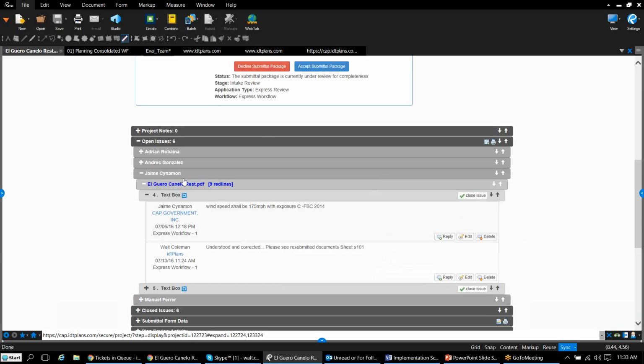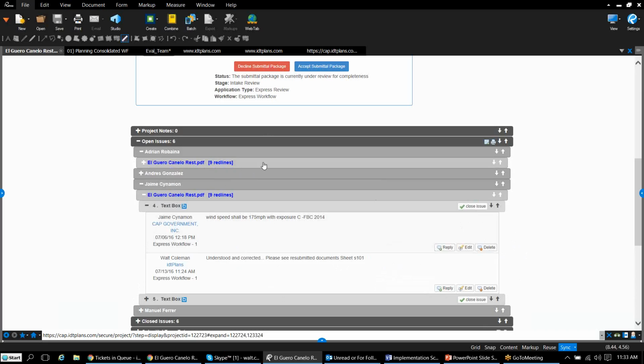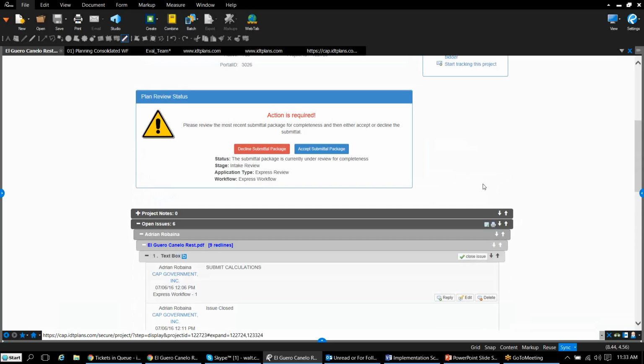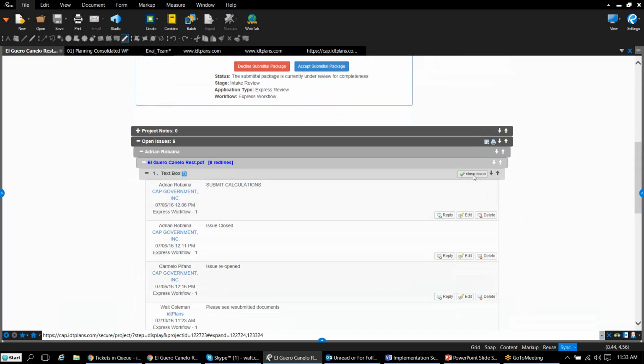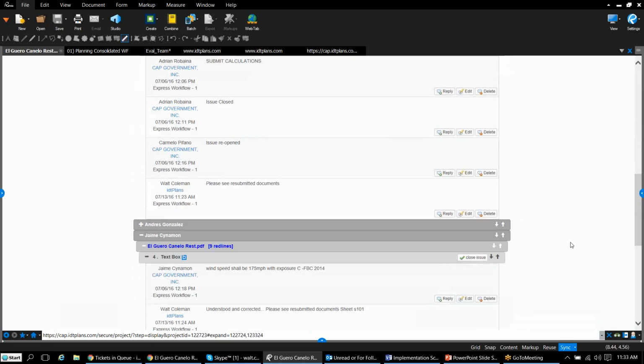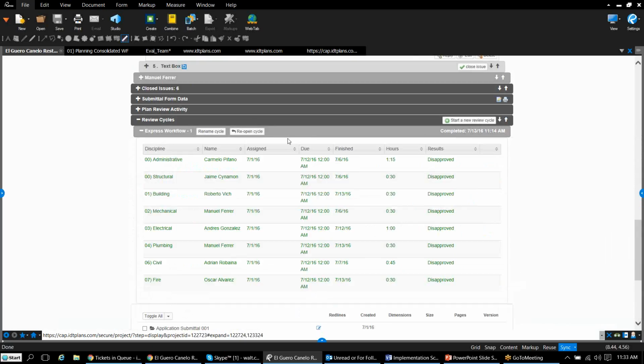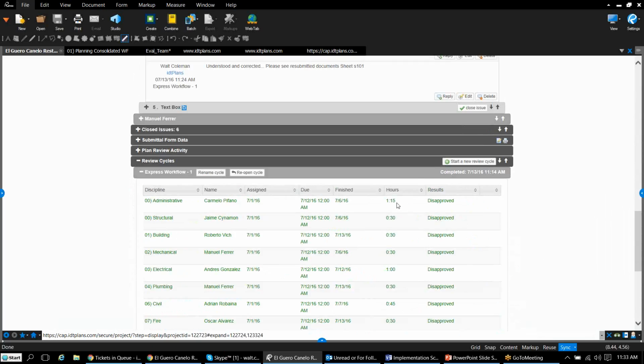So at this point, again, each reviewer comes in and takes a look at the response to his comment, and then hopefully, if it's an appropriate response, they'll close out the issue. Once all of the issues are addressed, then each reviewer has to come down and close out their portion of the review again.